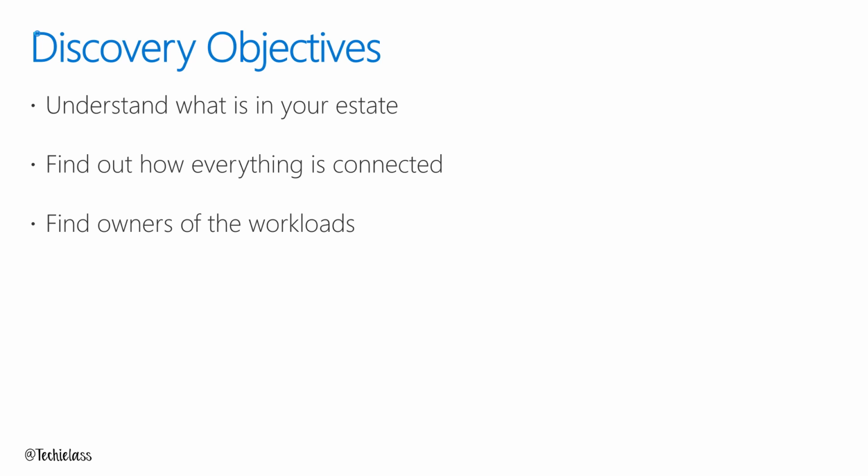And some of the critical paths, do they have a change freeze? Can they not have that application down or have any downtime during the application for a certain period of time? You know, are they going through a recruitment drive and really need that application to be rock solid and available for them during the month of April, say, for instance? And that affects your migration plans and your strategy as well. So speak to your business and include them as part of this process.